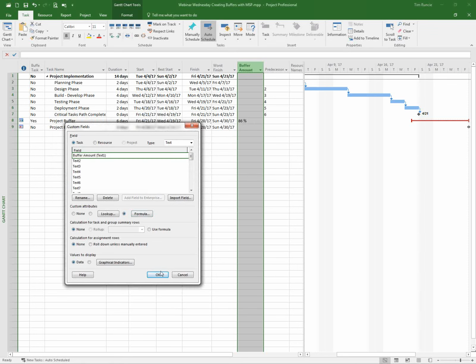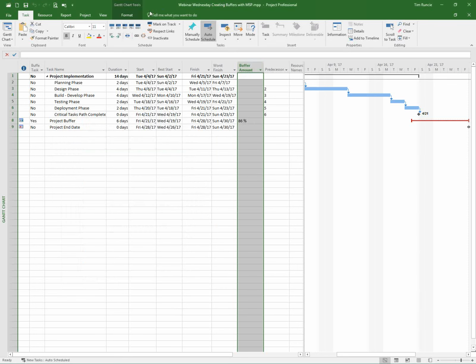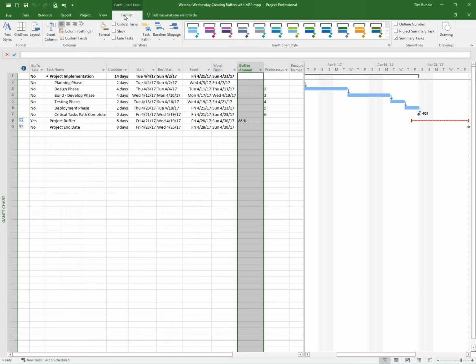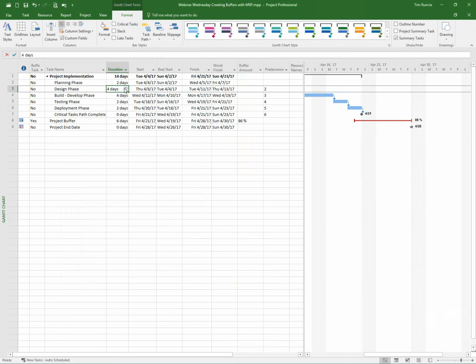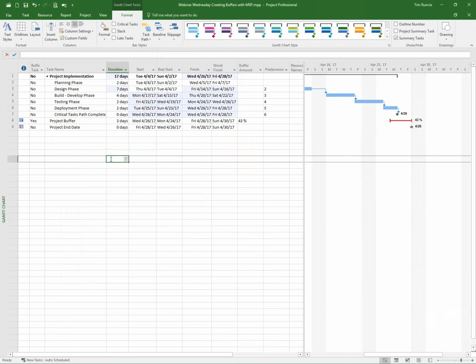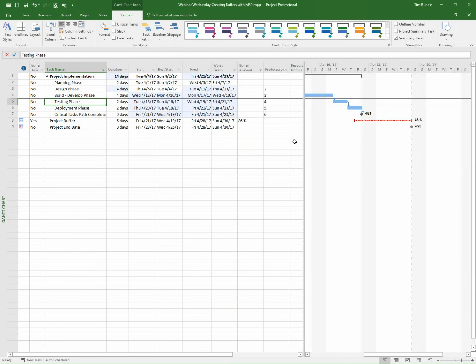Now, the idea is that as I'm looking at that baseline, which I have snapped up here for my project, as I'm going through and making changes or updating that schedule, the baseline is actually comparing itself with how much it had originally to what's left over. And that's the beautiful thing about having a nice little display there, as I increase or shorten my schedule, I can see how much is left or how much I'm using up. So you can do calculations around that.